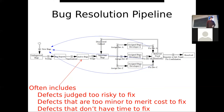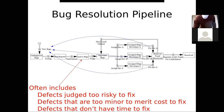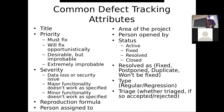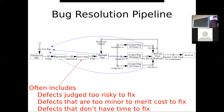Active bugs are marked in these databases. Then there's fixed, resolved, and closed — those come later in the process. As active bugs come up, there's a triage process. Project managers should realize this triage process basically involves deciding, as a deliverable approaches, the degree to which you're going to put time into fixing different defects. Sometimes you'll decide a given defect is not worth fixing — you don't have time, or the effort is too high.